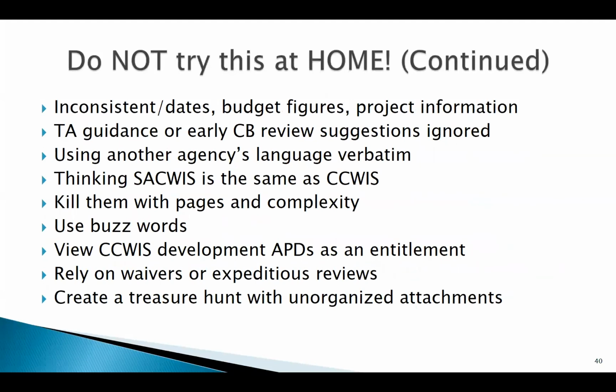We talked about this, it's a red flag when we see inconsistent dates or budget figures or project information about contracts. And in one part of the document, it's saying one thing and somewhere else in the document or an attachment saying something else. Those are red flags that are going to create delays in being able to approve your document.